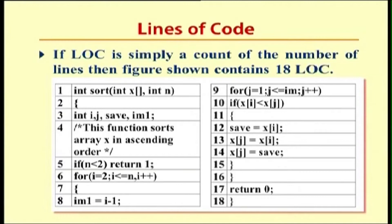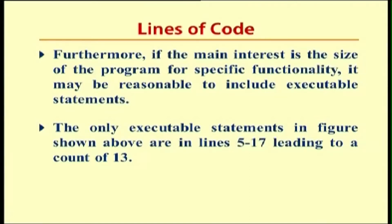Here is an example for estimating lines of code. If LOC is simply a count of number of lines, the example figure contains 18 lines of code for a program that sorts an array in ascending order. If we take 10 dollars to execute every line of code, this program costs 180 dollars. However, if the main interest is the size for specific functionality, it may be reasonable to include only executable statements.